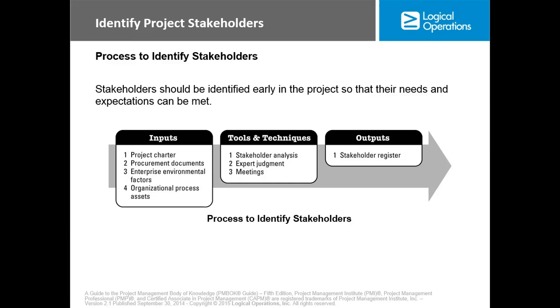stakeholders. So these stakeholders have to be identified on time, and you will find a way to manage them, either by absorbing them into the project or finding a way to help them out, because that water business is their source of livelihood, and it's possible they have invested their money and their time in it. So him coming now to bring up a pipe-borne water infrastructure in the community will actually affect them negatively. So they must be managed. Okay, so that's a clear example.